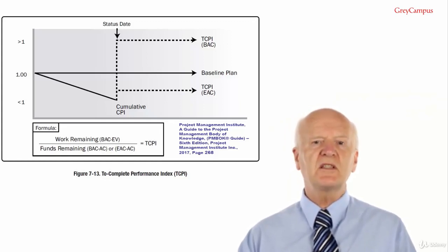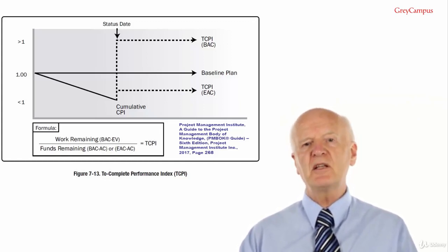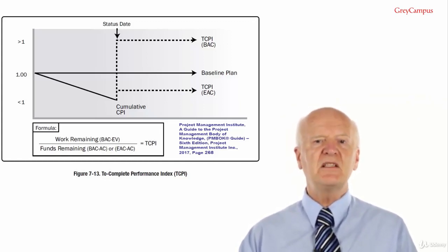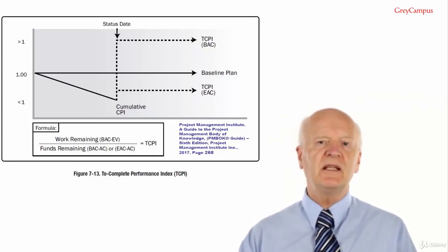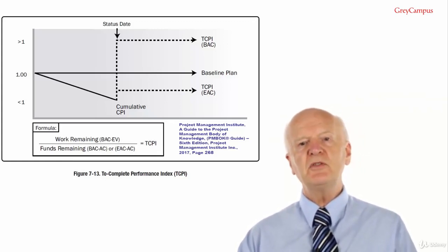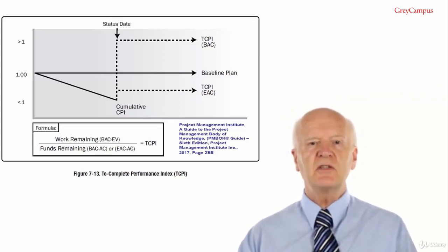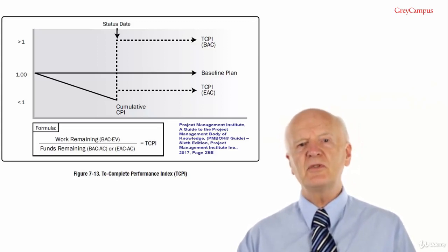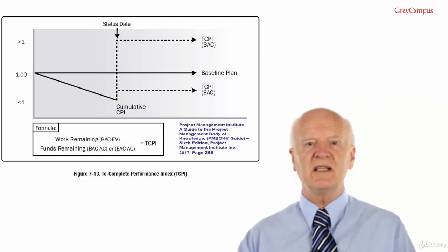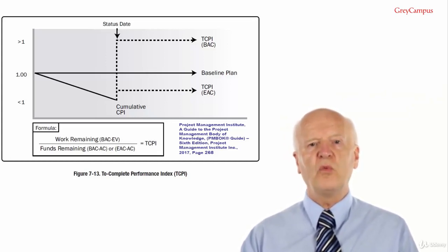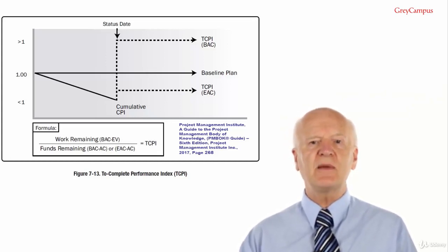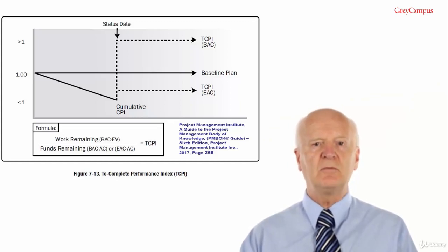As the project has progressed, we have routinely measured the Cost Performance Index, the CPI, and as I mentioned before, a negative CPI is a difficult one to recover from. And if the budget at completion, the BAC, is no longer viable, the project manager should consider using the forecasted estimate at completion. But at any point in the project, the To-Complete Performance Index, TCPI, tells us from this day onwards what cost performance index we have to maintain to reach our goal.